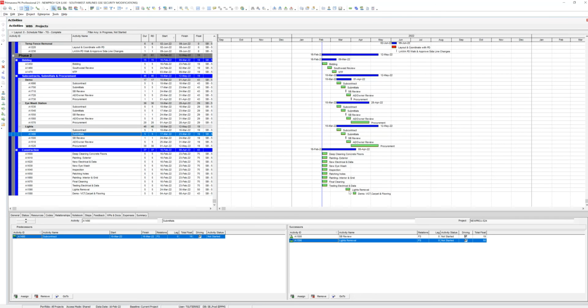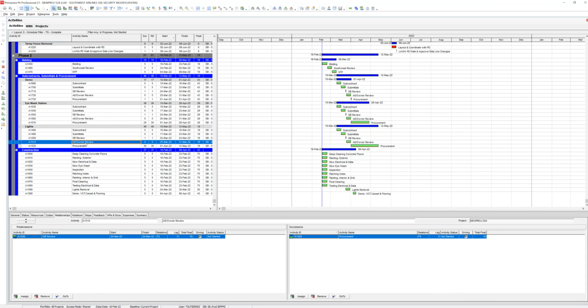Cool. So see, you can start lights. Why can't you start lights a lot sooner? Oh, that's what. Okay, you know what? Let's head to A&E review. No, you know what? Let's do this. Since the demo guy doesn't really have submittals, we're gonna call this submittals safety plan. But the reality is we have to review it and the owner has to. So let's keep it. That's a little conservative. We'll do the same thing for this guy. After the A&E review happens, we'll do the lights.